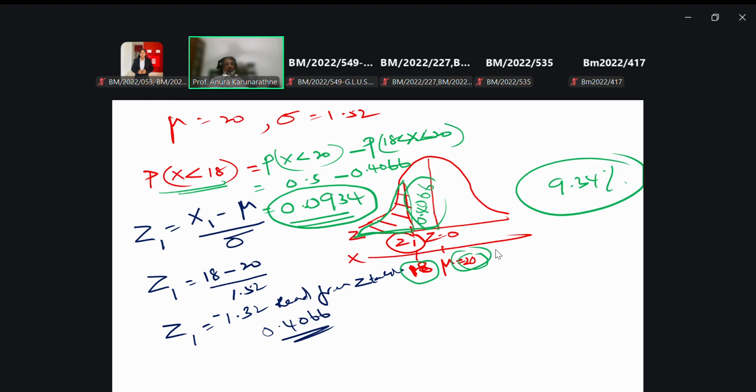Then for each activity, we converted them into a single time by using the expected value under the probability concept. Then we can make different decisions by using mu and standard deviations by using the standard normal formula and the standard normal curve.